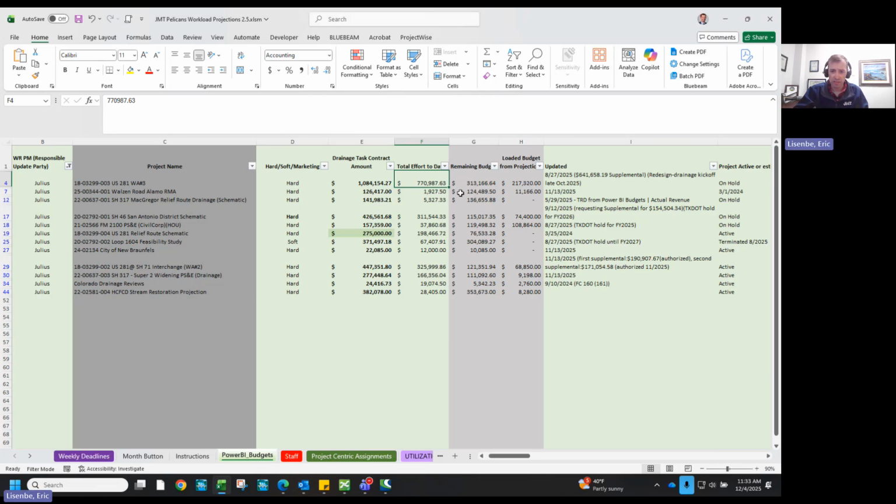will we go over budget? So this remaining budget, you're hard entering what the budget is and what the effort to date is off of Power BI. It doesn't go in and grab it. It's really complicated to do that because, one, it's often not an overall project budget. It's a summation of different tasks within a major budget. So we just hard enter these, and we do it periodically, maybe every month, every other month or so.